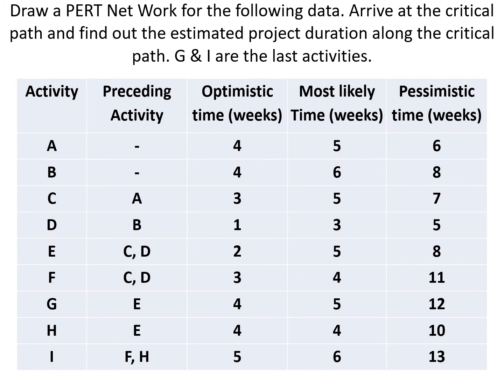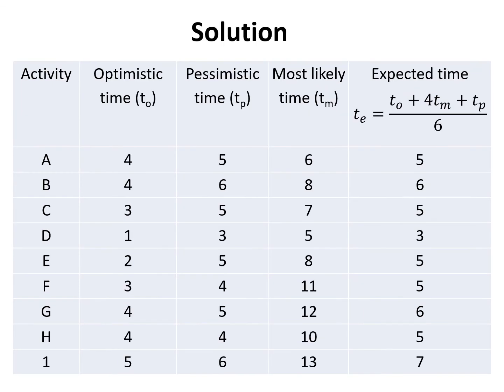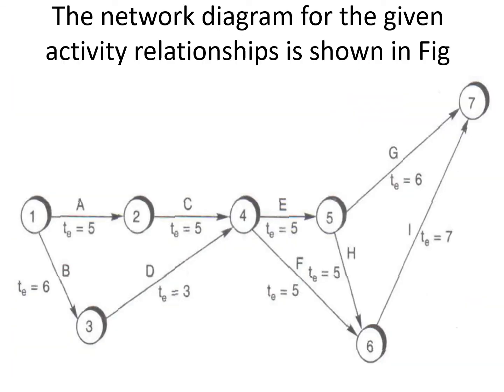In PERT diagrams, the main building block is the event, with connections to its known predecessor events or successor events. A PERT event is a point that marks the start or completion of one or more of the activities. It consumes no time and uses no resource. When it marks the completion of one or more activities, it is not reached until all the activities leading to that event have been completed.